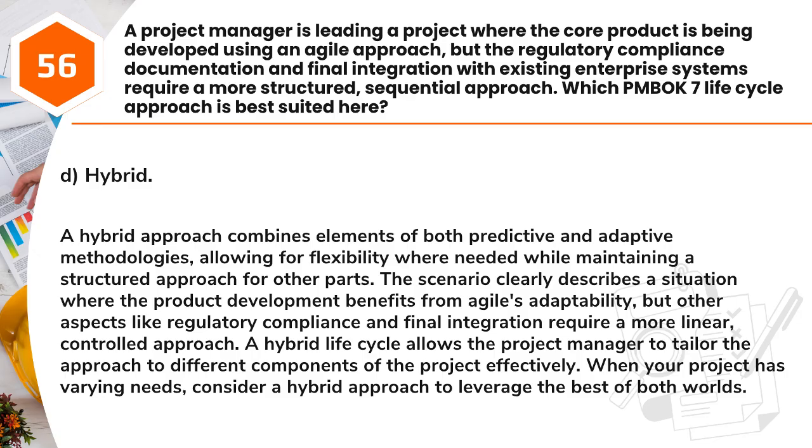Answer: D. Hybrid. A hybrid approach combines elements of both predictive and adaptive methodologies, allowing for flexibility where needed while maintaining a structured approach for other parts. The scenario clearly describes a situation where the product development benefits from Agile's adaptability, but other aspects like regulatory compliance and final integration require a more linear, controlled approach. A hybrid life cycle allows the project manager to tailor the approach to different components of the project effectively. When your project has varying needs, consider a hybrid approach to leverage the best of both worlds.